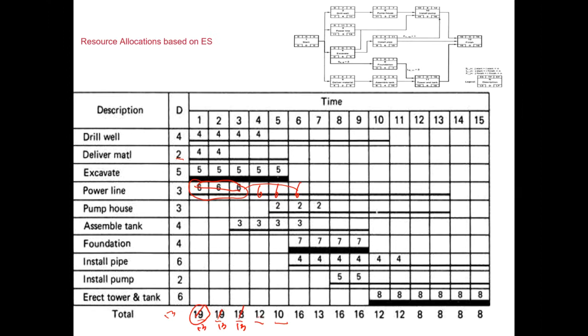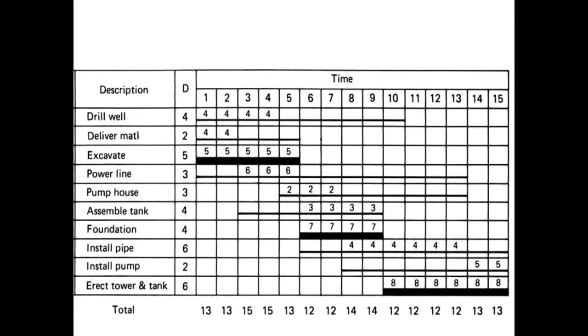Again, this is a very sharp spike, but we can take it slightly later, so we can play around with it to see how we could get a more leveled resource profile. So in this arrangement, which is shown here, certain decisions are taken by the project manager, which is resulting in not an ideal world situation, so not a consistent 14, but you could see a slightly smoother resource profile, not as much fluctuating as the previous example.